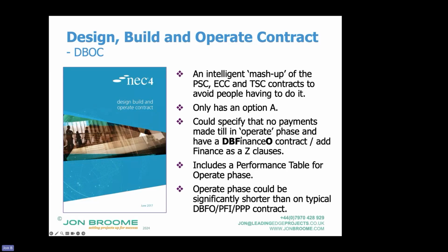So you could, with a very simple amendment, say, I'm not making any payments to you until this is operational. You need to go and arrange finance. I'm not interested in the finance arrangements. You go and do it. Or you could say, rather than having a hugely complex DBFO contract, we'll have a design, build, operate contract, which the industry's familiar with, and we'll add on the fancy finance bits.